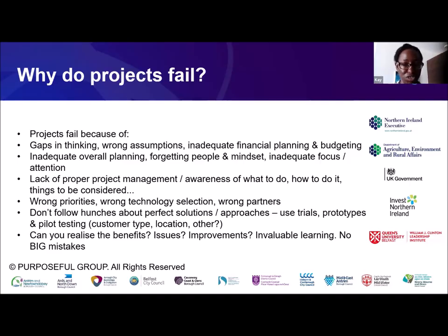Again, if you go through this digital transformation plan that I've just run through with you, there's less chance of you making any mistakes and errors there. Now, I would suggest that you use some sort of trial or prototype or pilot testing, because that way, if you have an idea about how you want things to work, you run some kind of pilot or test. You may even do a pilot with a couple of approaches, A and B, right? It can be worth doing that just so that you don't go a few months into this and say, oh, this was totally the wrong thing. If you have some kind of pilot test or way to test this early, there's much less chance of you making any serious and severe mistakes. Next slide, please.